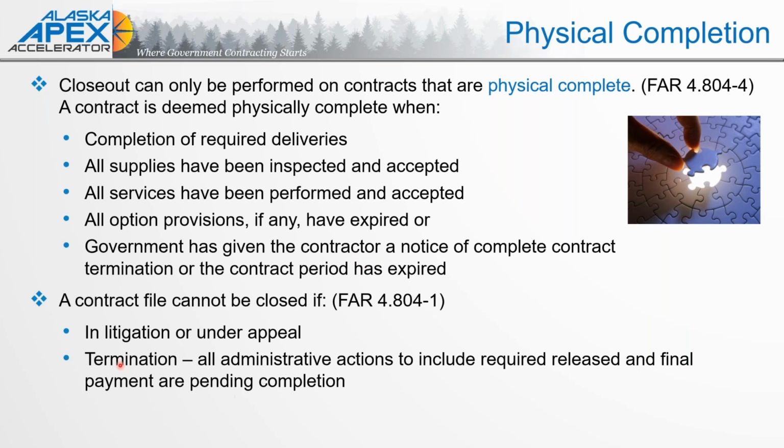And then the exception for contract closeout, a contract file cannot be closed if it's under litigation or under appeal, or if there is a termination process in place.